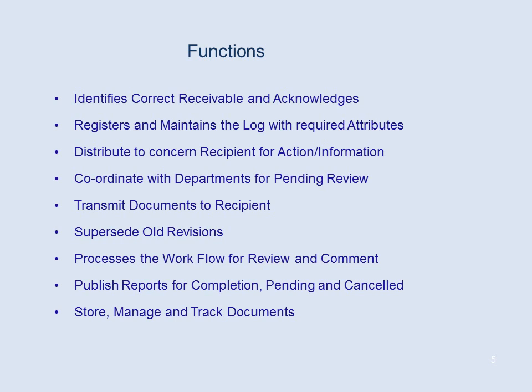Document controller has to store the latest document in the storage area, and the rest are superseded with a stamp and kept separately till the commissioning and completion of projects.